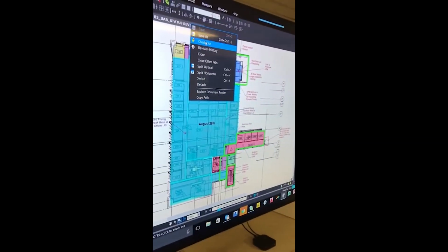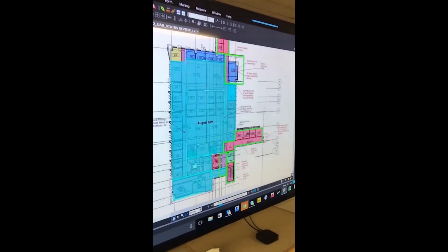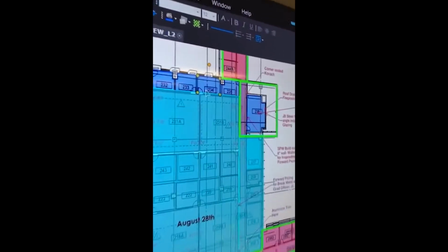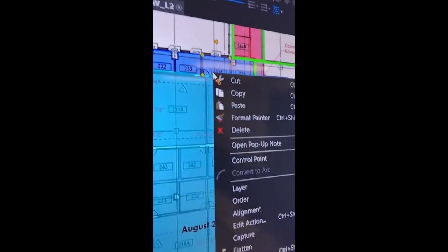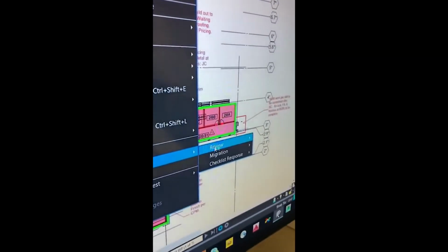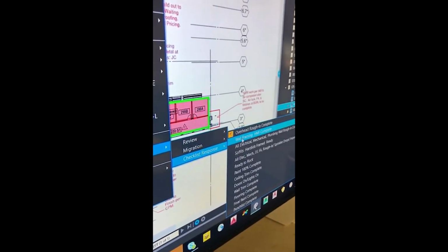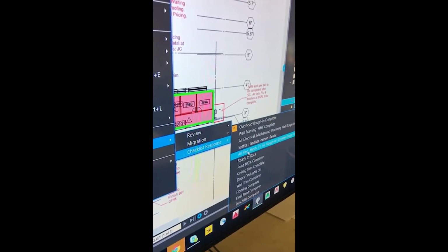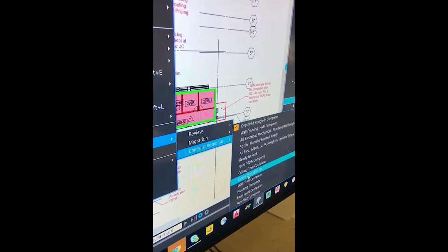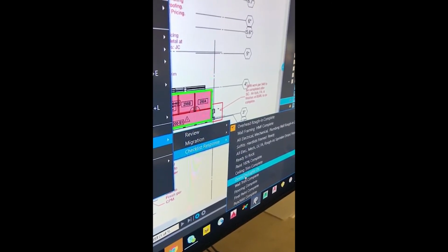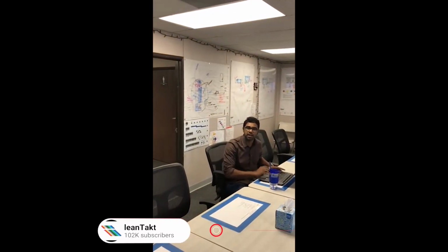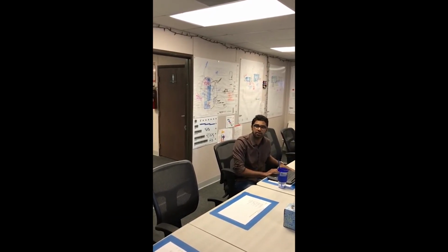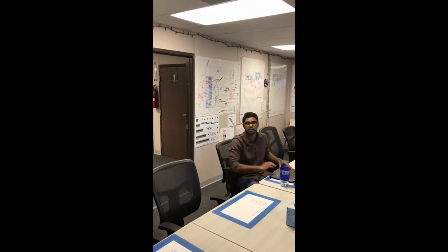Okay, so for each drawing, what we do on Bluebeam is checking out, and each area can be checked, the status can be checked, and how we do that is check this box, and that is room 234. And currently we can right click on the computer and say set the status, which says what are the status: wall framing complete, soffits complete, or overhead MEP or ready to rock, all those status that is required. And when this is seen by the team that is coming in to that room from the next week, they can see the present status this week, and they can proceed to mobilize their crew to those rooms. That's the intent of having this color-coded statuses.